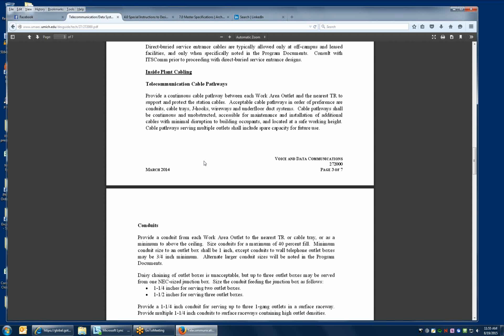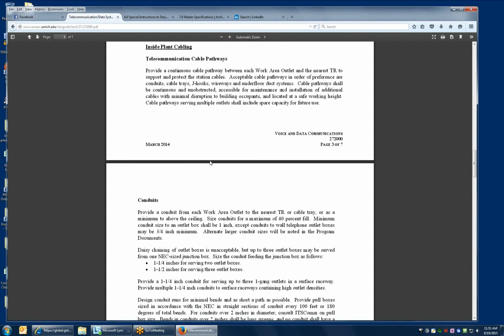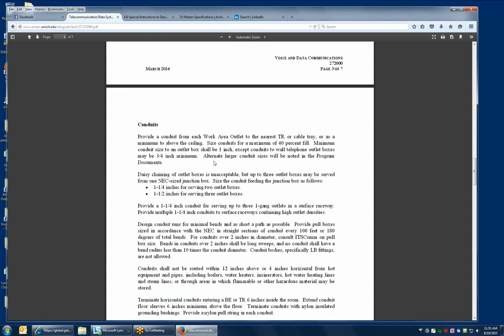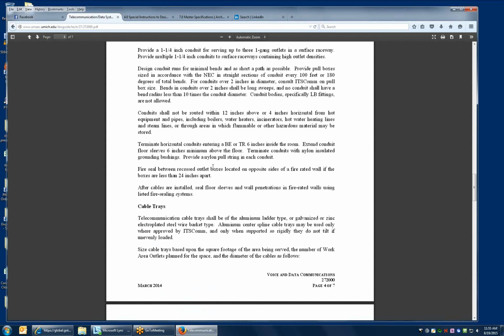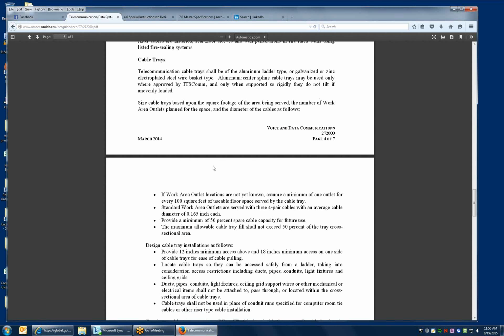So we're trying to scale back to only 2 cables per office desk. But at the checkout areas, now they've got label printers for everything. You need a minimum of 4. And for critical care rooms or the nursing areas, it's tough to get the cable count right. It's not cookie cutter, and a lot of the critical care areas they just redesign.